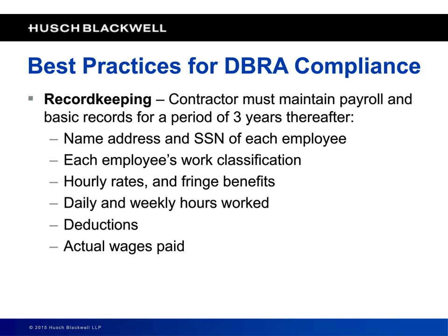All right. My last two slides here are going to deal with the kinds of records that you need to be keeping. So the first thing that you need to be keeping are the things that you're obligated by statute to keep. And that is basically only two things. It's going to be your 347 certified payroll submitted for yourself and for each and every one of your subcontractors.